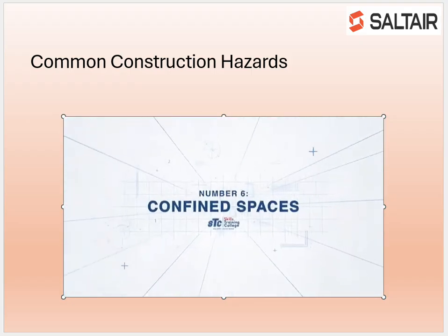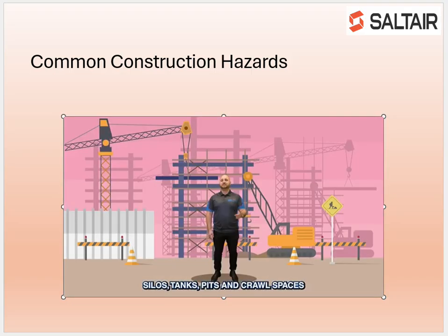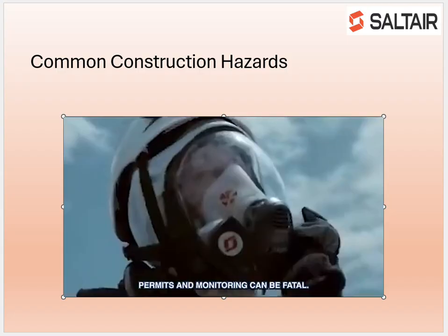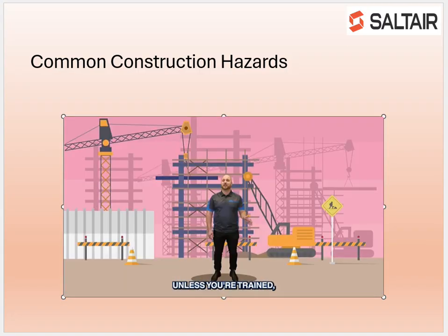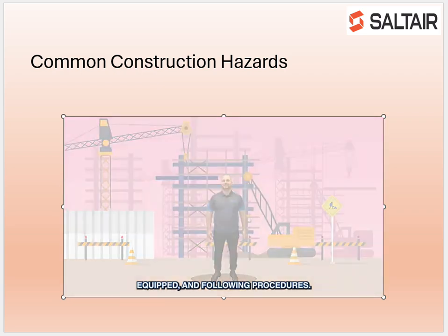Number 6, confined spaces. Silos, tanks, pits and crawl spaces are often oxygen deprived or filled with toxic gases. Entering without proper ventilation, permits and monitoring can be fatal. Never work in confined spaces unless you're trained, equipped and following procedures.